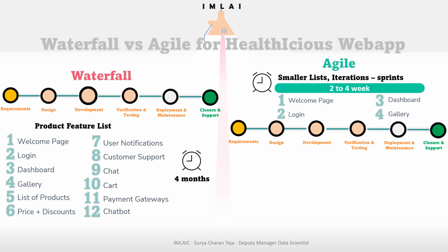That's the difference. Whereas in waterfall, 4 months is just for development. It takes more than 6 to 8 months to get the first feel of the application. Whereas in agile, he feels it within 2 to 4 weeks. That's where the confidence gets built up for the client. He enjoys it because he can see some of the features being developed, deployed and exposed to the external world. So once these initial four requirements are fulfilled, the cycle will be repeated.